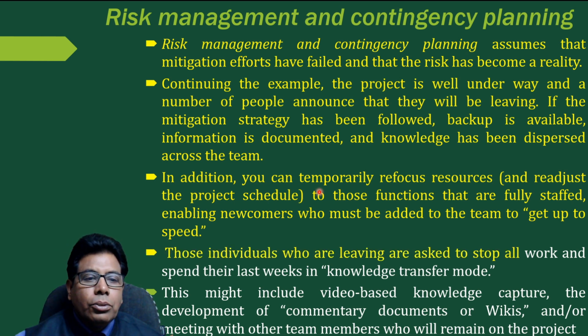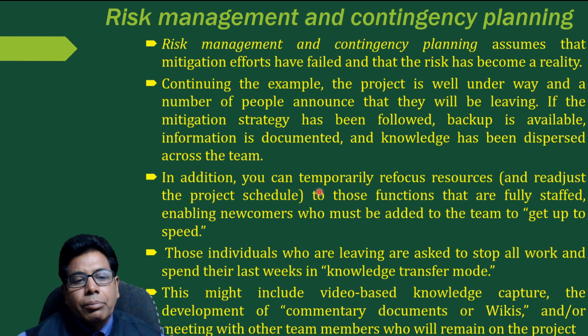Then those individuals who are leaving are asked to stop the work and spend their time transferring the knowledge to others. This can be done with video-based knowledge capture and development of commentary documents or weekend meetings, and even individual meetings can be conducted with the team members who are in the project so that knowledge can be transferred.